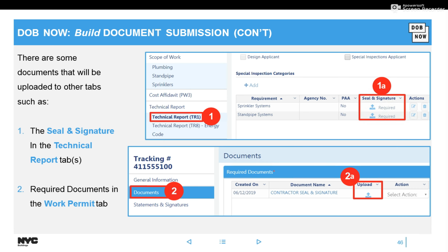Throughout the system, the DPL1 form is required. So that's the only paper for now you're going to keep nearby, like on your desktop. When you print that form and get it signed and sealed and you date it, it's valid for a year from the date on it. So you keep that on your desktop, and every time you see a role within the system and it asks you for that seal of signature, you would upload it there.